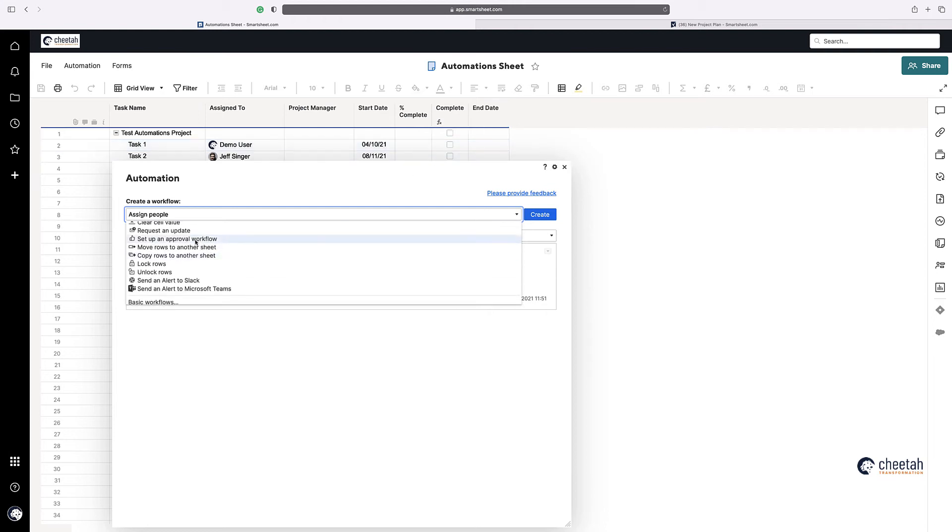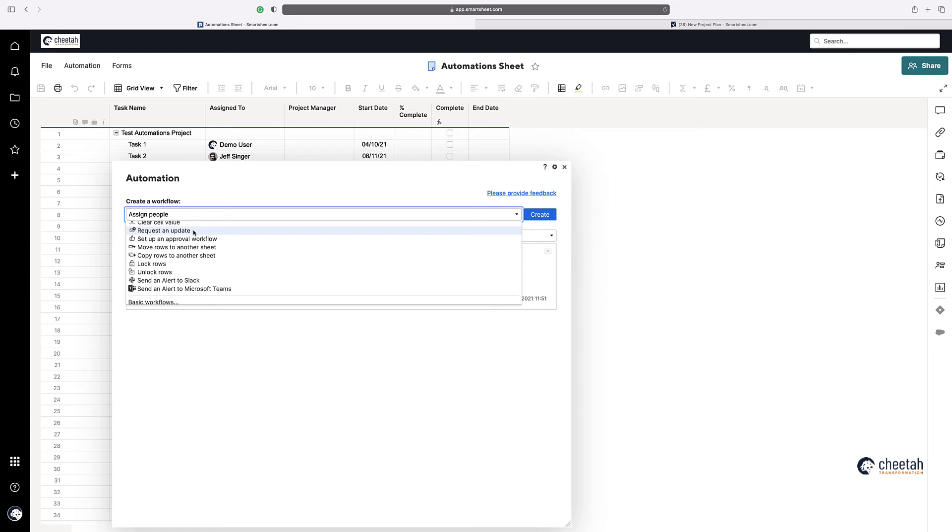A request and update is quite powerful. That's where instead of constantly chasing people on the project plan saying, have you done your task? Have you done your task? You can actually set up a workflow and automation to say, depending on the date, if it's in the past or if it's becoming due in the next seven days, request an update from the person. And actually that person will get a notification or an email from you to say, request an update on what's happening on this. So you can actually update the status of that item.